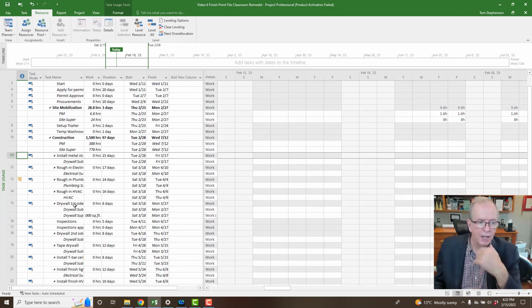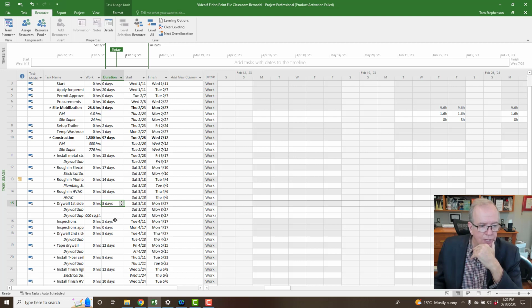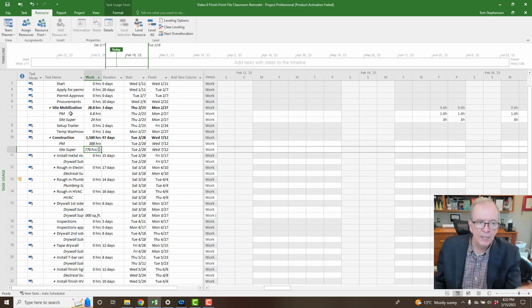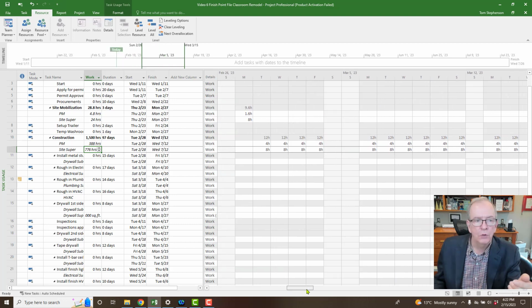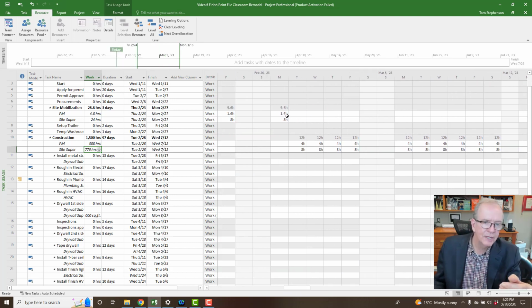So it's just flipping it around and basically what's the duration of the tasks, right? And you can see if something is work related, how many hours each work-related trade or management person is on those particular activities and tasks. So you can pick up on those particular elements. And that's why it's 1.6 hours. It's like this oddball number because we put the PM, if I remember correctly, 20% to the project. So 5 times 1.6, it's 8 hours, right? So that's where that's coming from. It's just adding these two together to show you the 9.6 hour allocation. So that's helpful from that.